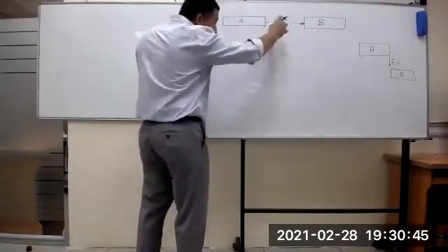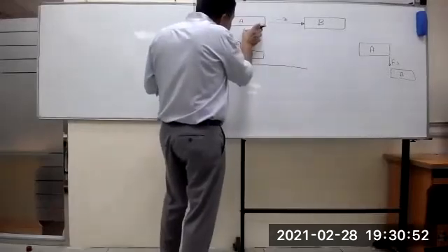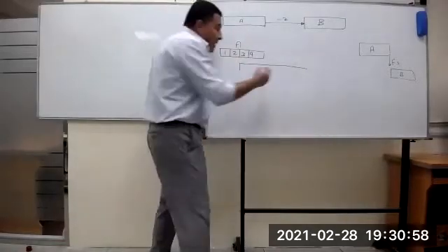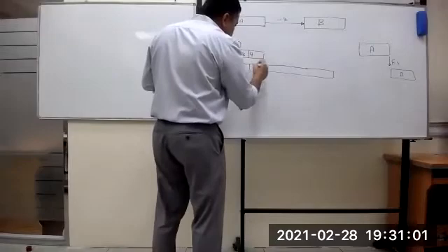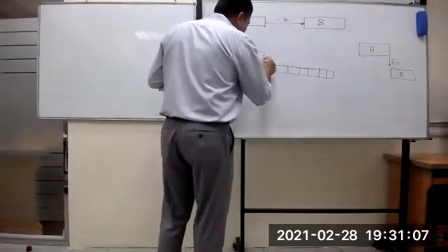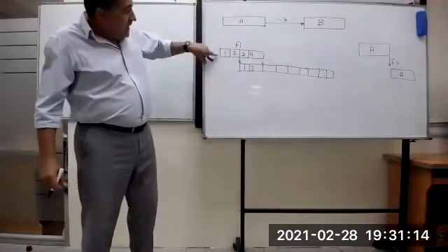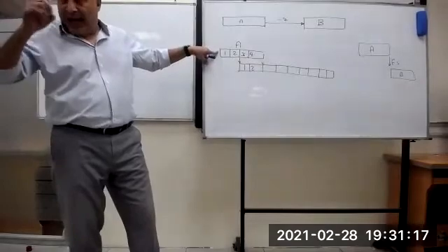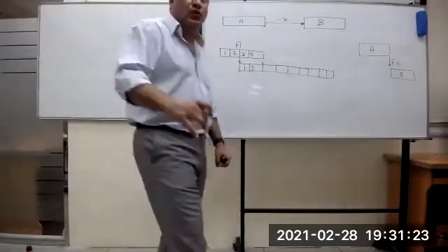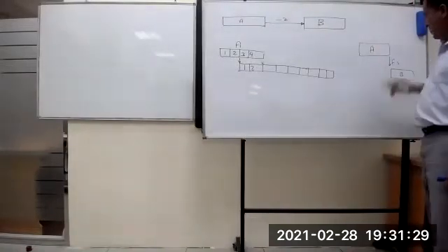This is activity A. And the minus 2 means what? Before this activity finishes, 2 days. Activity B, whatever its duration, even if 10 days. It means that 2 days before activity A finishes, activity B has to, must start. So activity B will start.